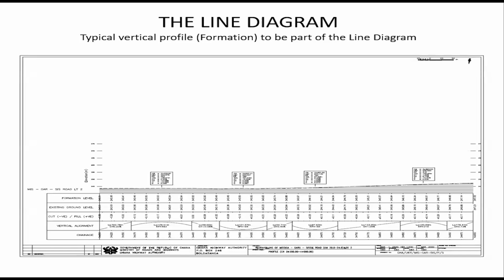With these two, implementation becomes much easier because we have design to formation. As for side base, it is just thickness against the width, or it's in area, so there's no problem about that. So this is very important. Every line diagram must come with a vertical profile design to formation so that the volumes can be captured very well.